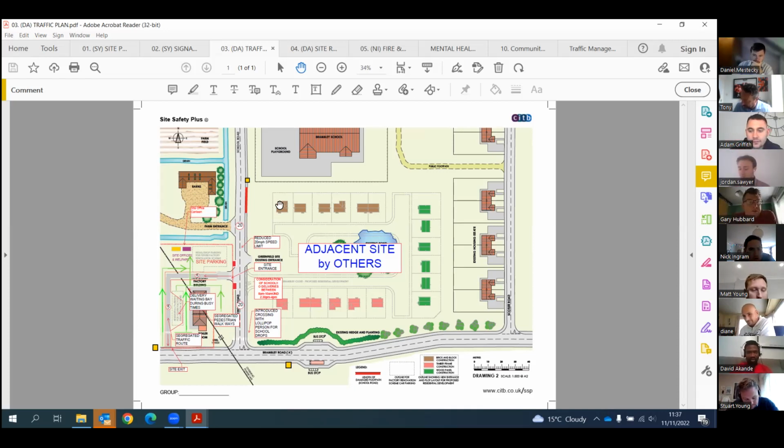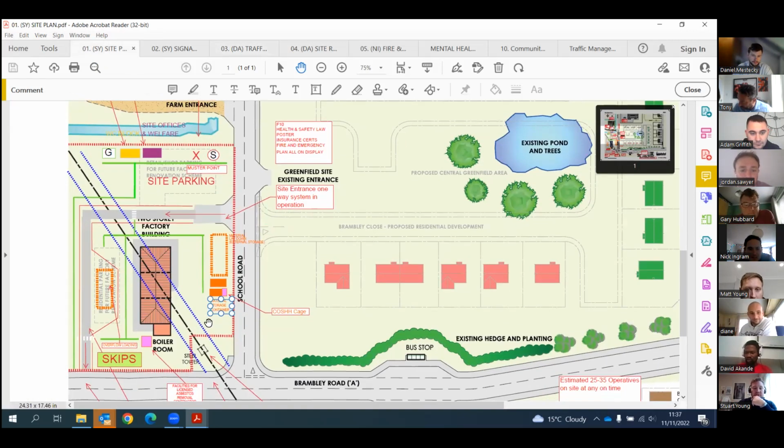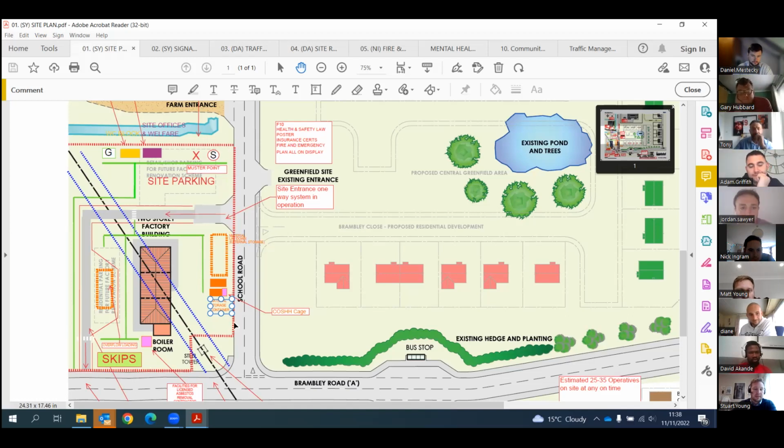You may have said this, but how are you getting power and water to the welfare units? Okay, so one of the major restrictions we had around site with planning applications was there was a real pushback on placing cabins anywhere along this boundary line, and not wanting to have welfare facilities and cabins up against these, for the fact the children are walking past. This led us to positioning the cabins in this back corner, so we're well away from the access roads around.